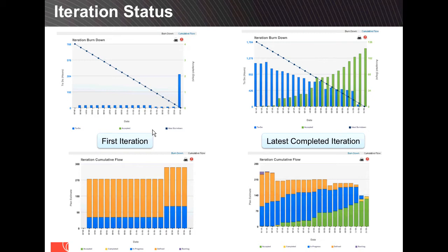The code review is being done, so it's potentially shippable. And so the burn down chart is telling us a couple of things. In this particular example, I think it took this team 4 or 5 or 6 iterations to get to this level. But we're seeing a steady burn down of work. As the work is completed through the iteration, that's the blue line. It's not always going to track the ideal line perfectly. That's perfectly acceptable, as long as the trend is towards completion by the end.